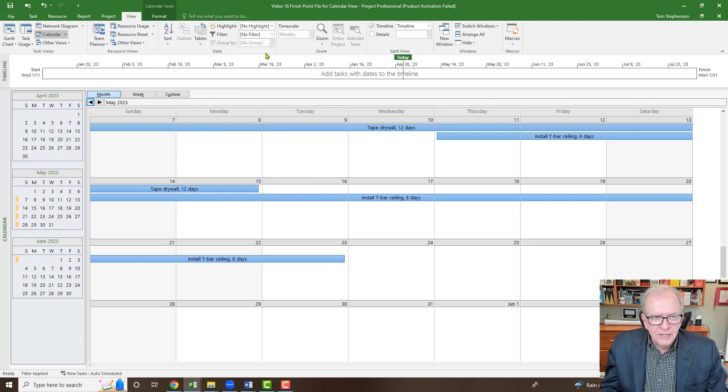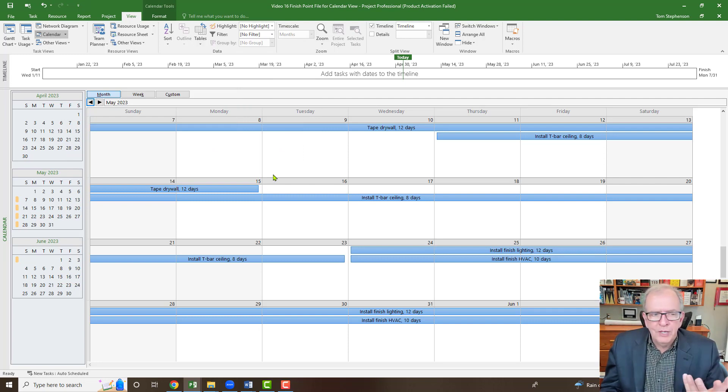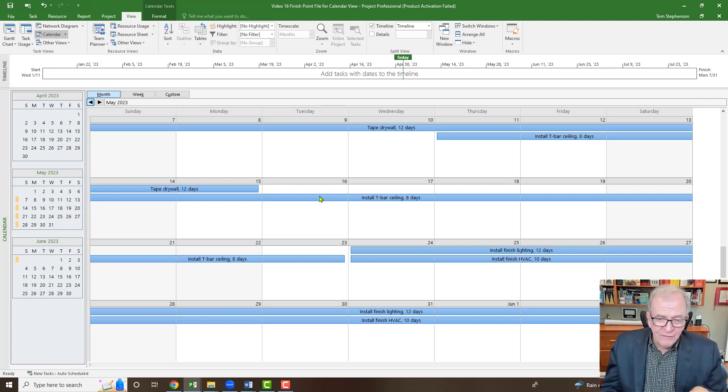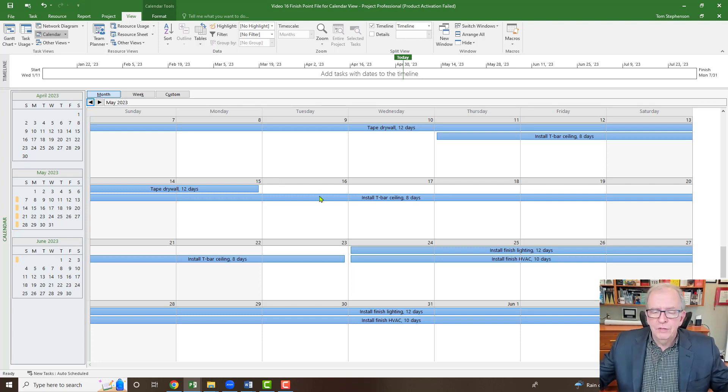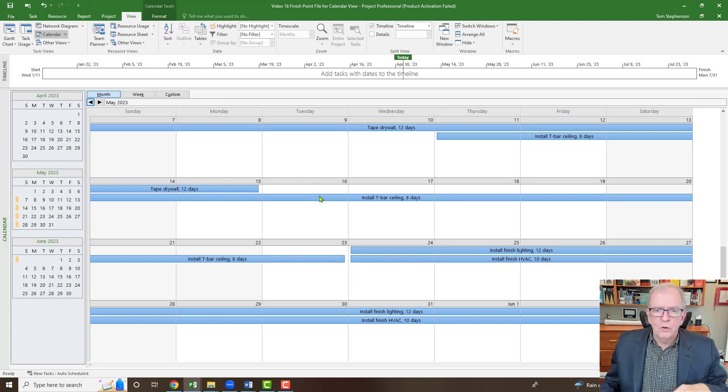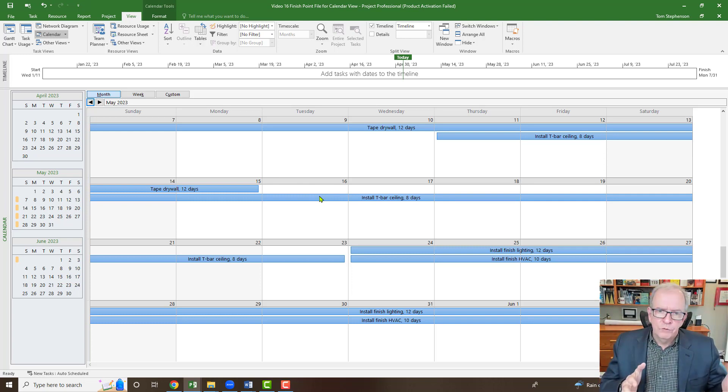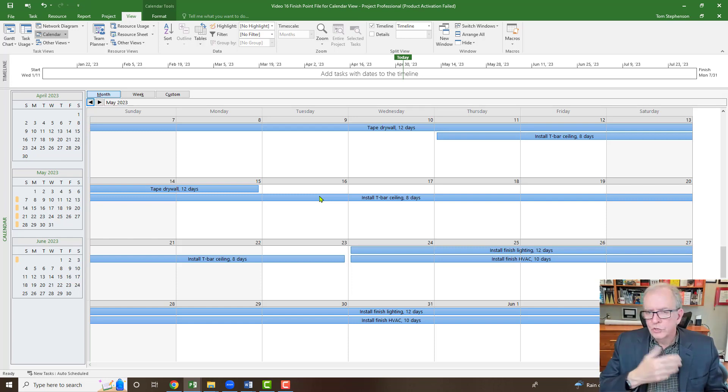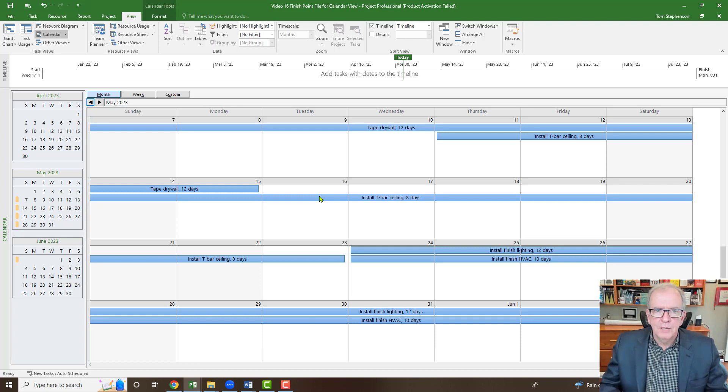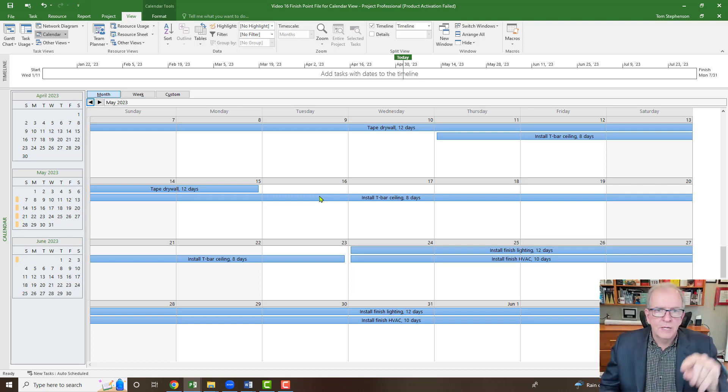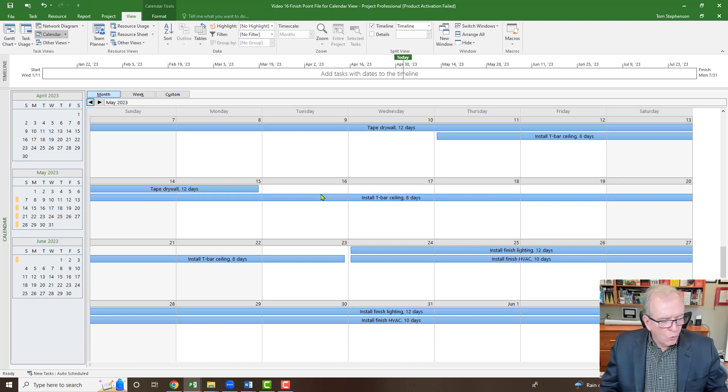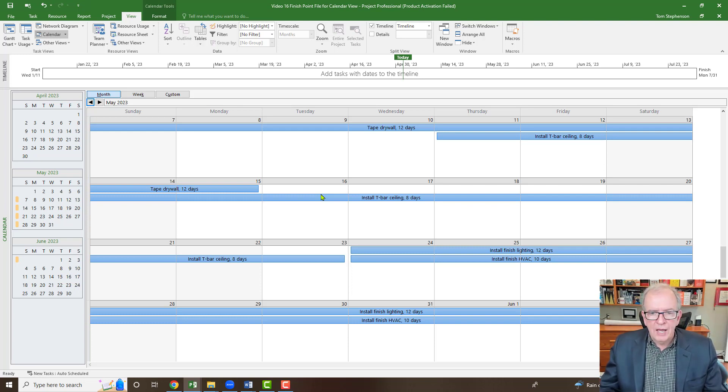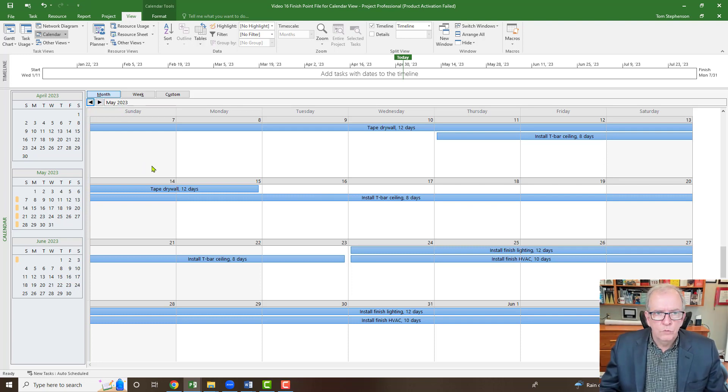You always got to look at who am I communicating this information to and what's the best way to do it. For a lot of trades is to have the calendar and maybe to have the drawings, and then a highlighter and going over the zones that they're going to be working out of, or doing it on a digital sheet. The drawings and maybe with something like Bluebeam highlighting the different zones that they would be working in while discussing the dates that they will be working. Having the calendar there can be helpful as a tool to look at it.